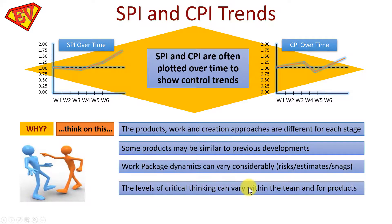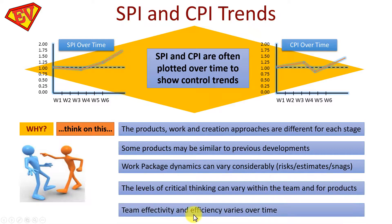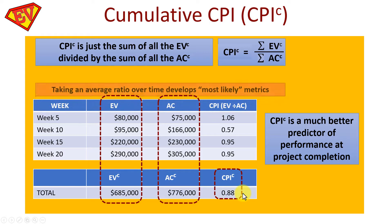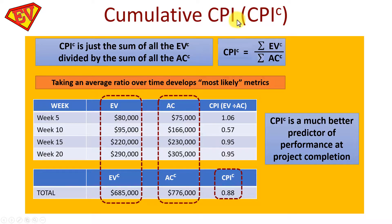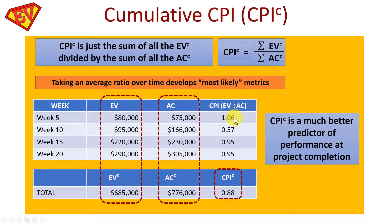Critical thinking levels vary within the team and for different products, and team effectiveness varies over time — simply the natural human condition. So it makes sense to calculate CPI and SPI trends, which leads to the next two formulas. Cumulative CPI — often written CPI with a capital C — is the sum of all Earned Values divided by the sum of all Actual Costs: Cumulative CPI = ΣEV ÷ ΣAC. Here's a simple example over 20 weeks with the CPI for each period shown.